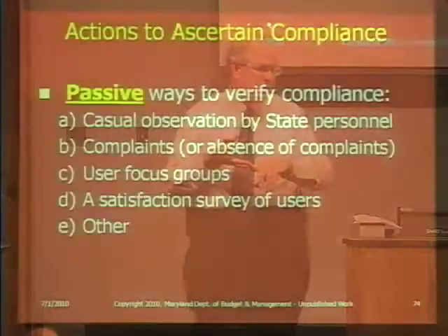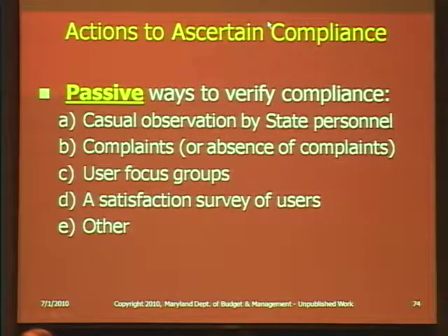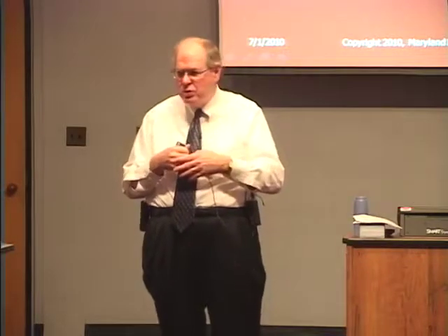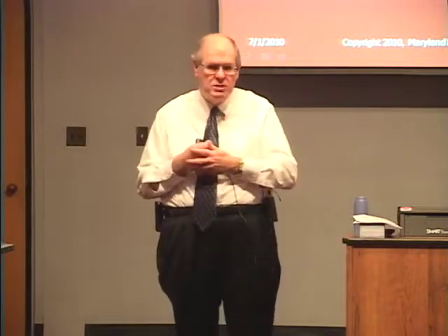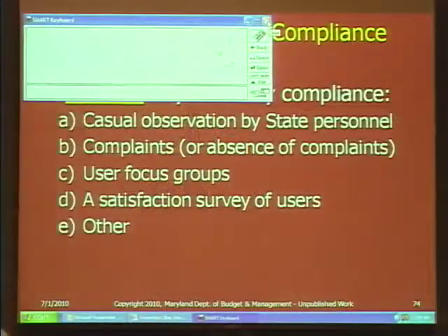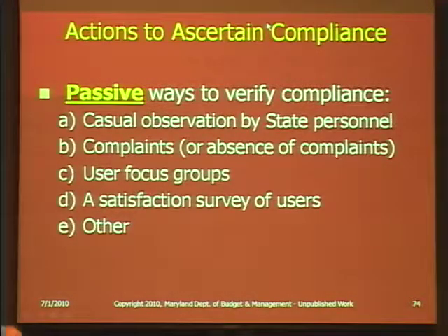Or satisfaction surveys. Probably most of you have health contracts through CareFirst or Aetna or one of these providers. There are satisfaction surveys that go to the state employees every year, to try to measure their satisfaction with the health providers. And based upon the results, whether 85% of people are satisfied, 90, 95, etc., that indicates the job they're doing. So we use surveys of customer satisfaction for the health benefits plans. And there can be others, but these are the things that are most readily used for passive.